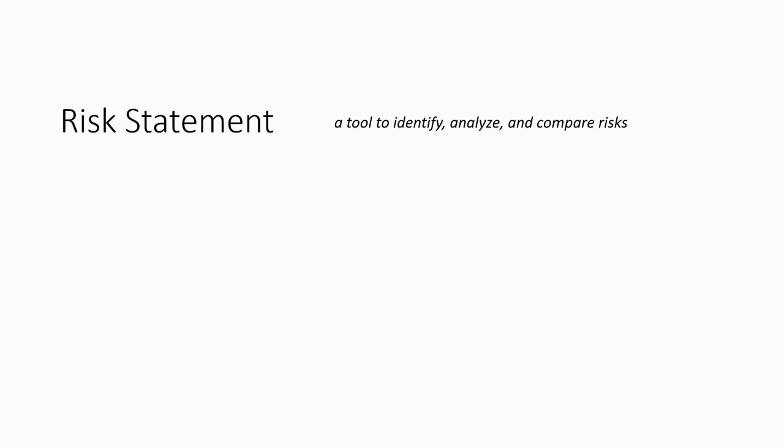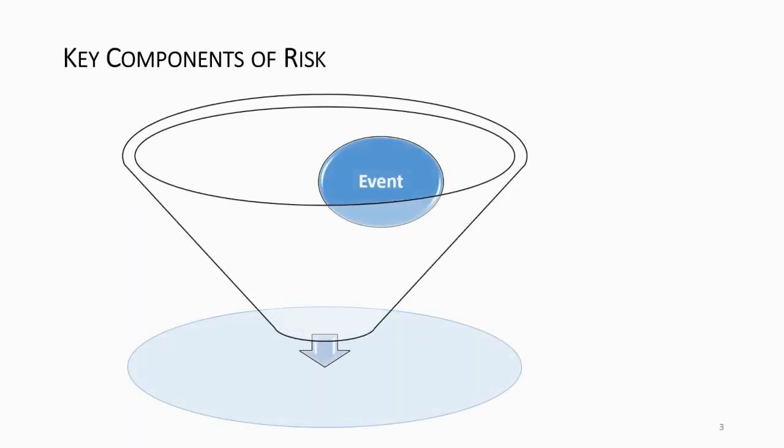How the risk statement is set up: if this particular event occurs by such and such a date, it will have a particular impact on the build. It will have this impact on cost or quality. So the items that you need in it is the event itself.